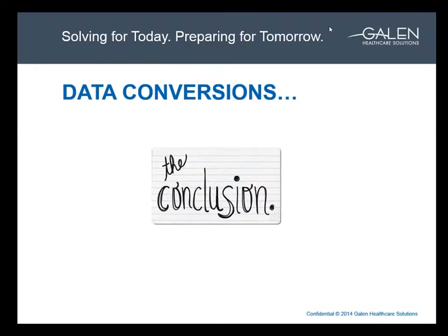Thanks, Bruce. I don't know, Erin, if you have any kind of guide. I think really what happens with the large-scale testing is looking at the total population of patients, the total number of data elements coming over, and then coming up with a subset of that. It's a discussion, and I know that a certain percent, like 25%, is sometimes used, but let me say this: it can take an awful long time to validate even just one patient, so you have to balance how much time and how many resources you have available to do the testing. So I just think it's hard to answer that in one pat way.